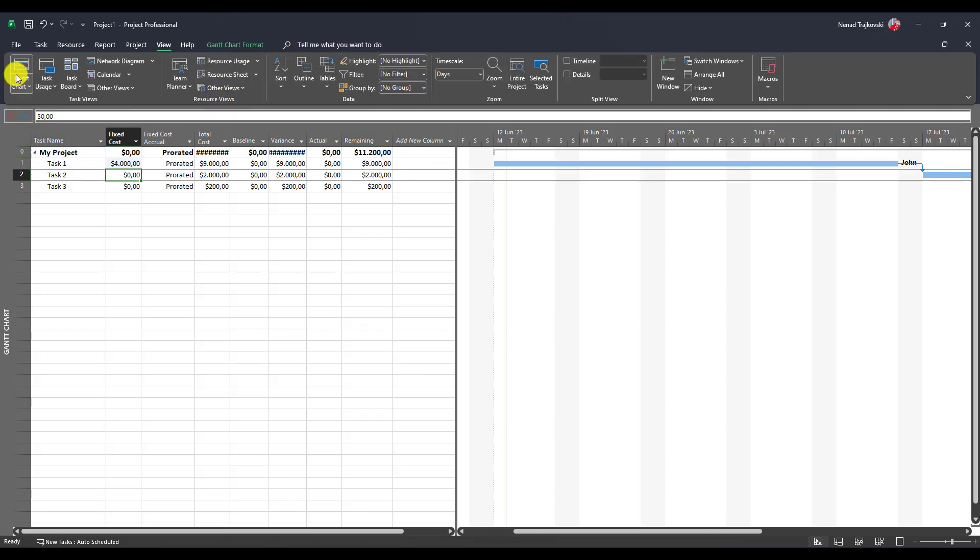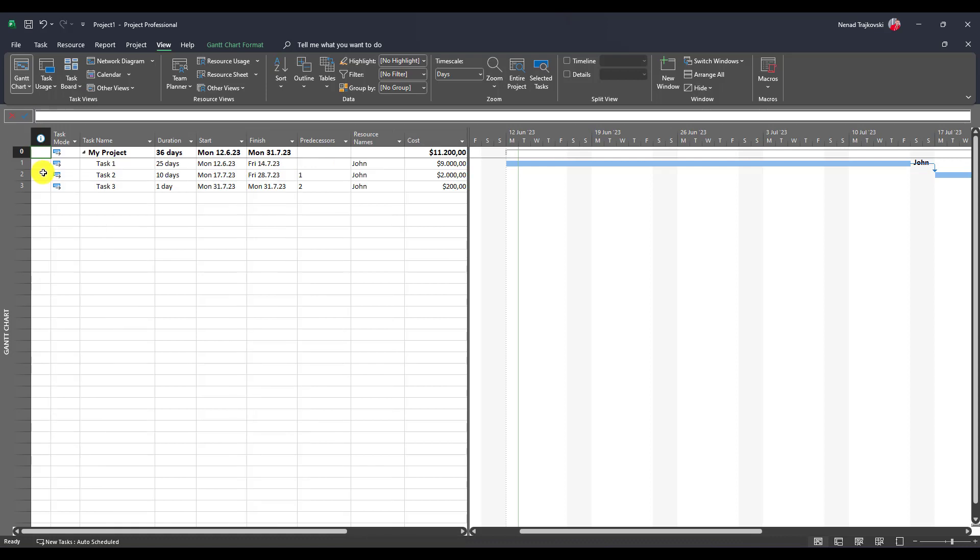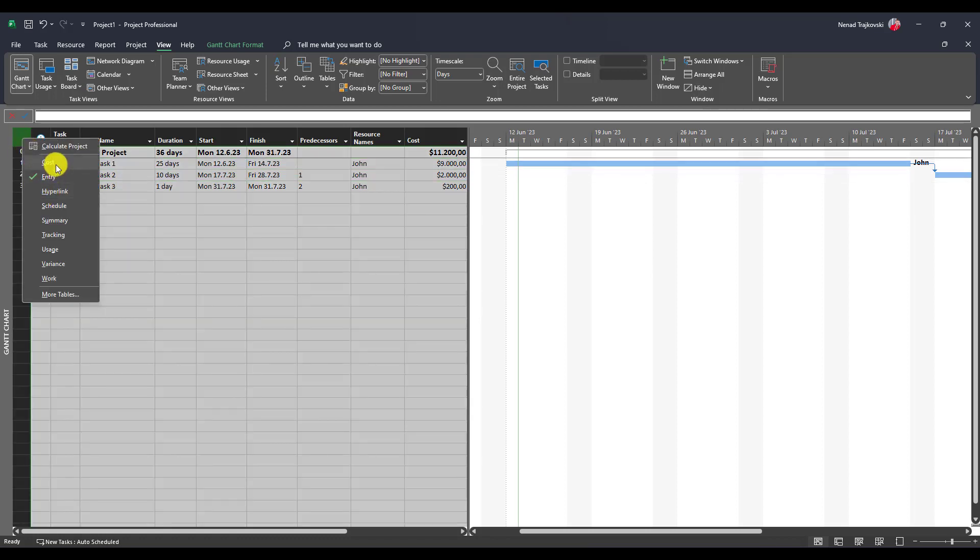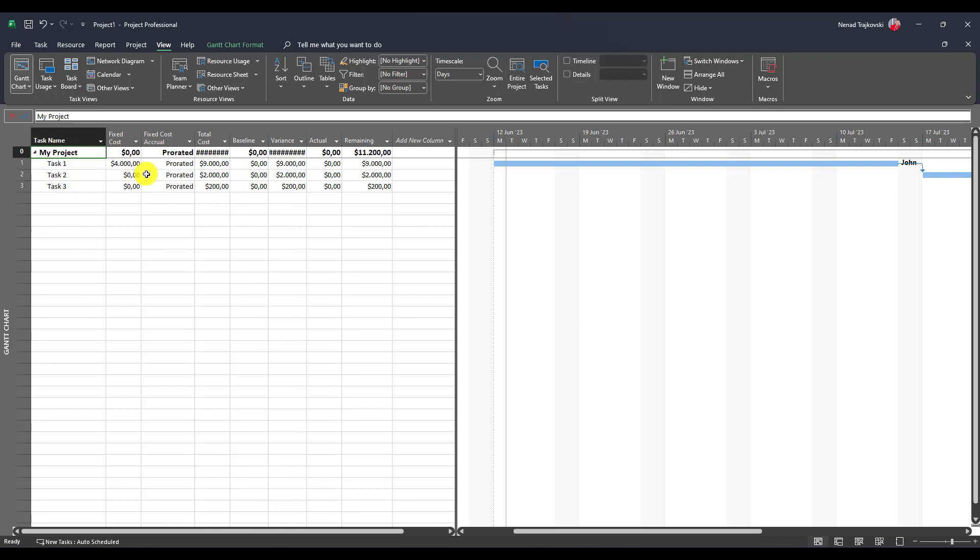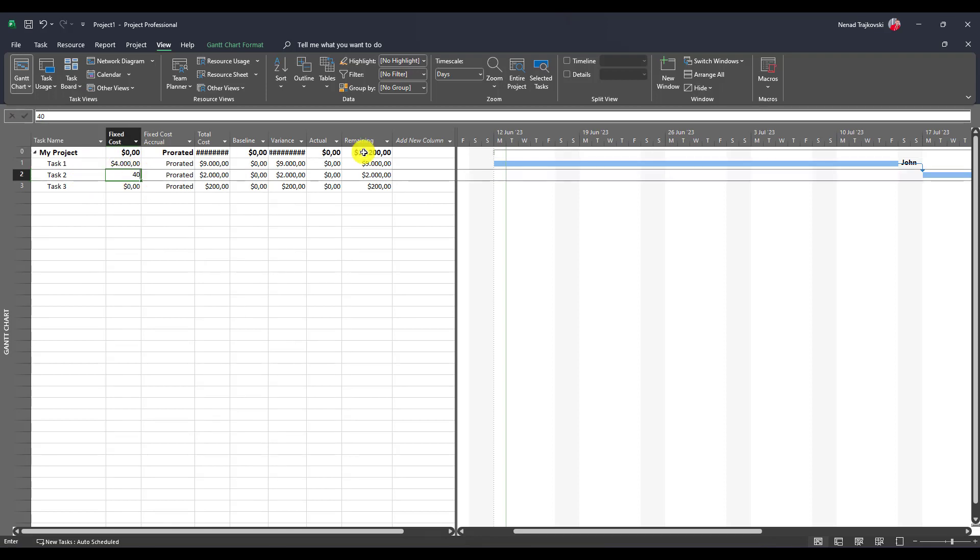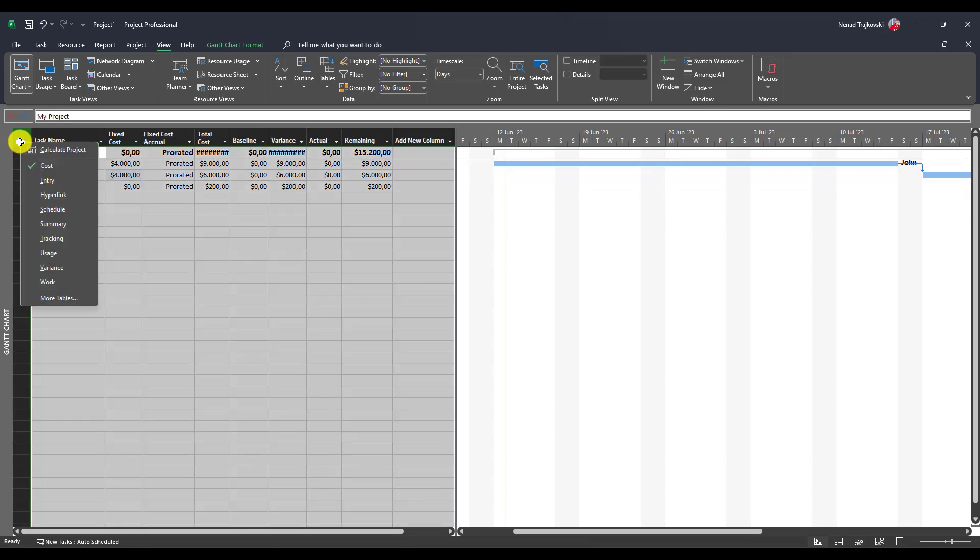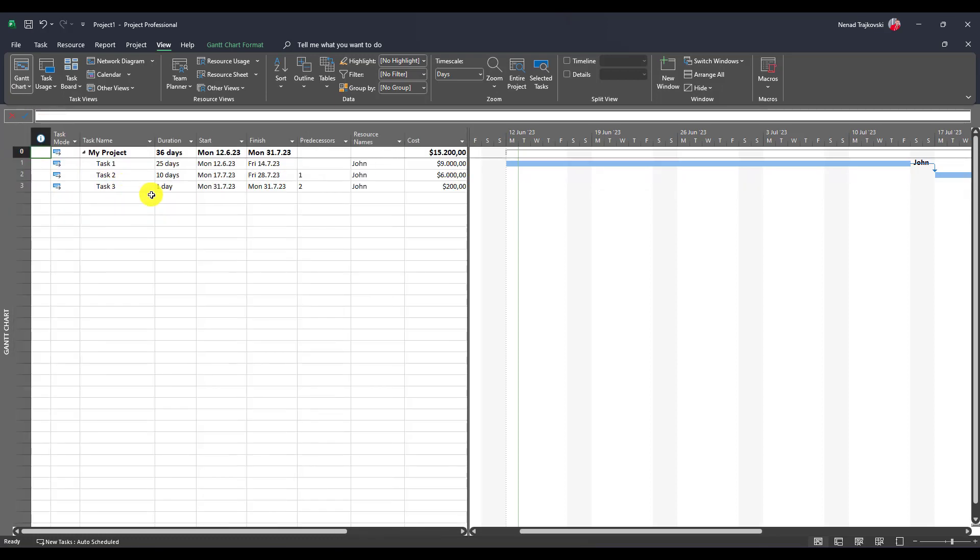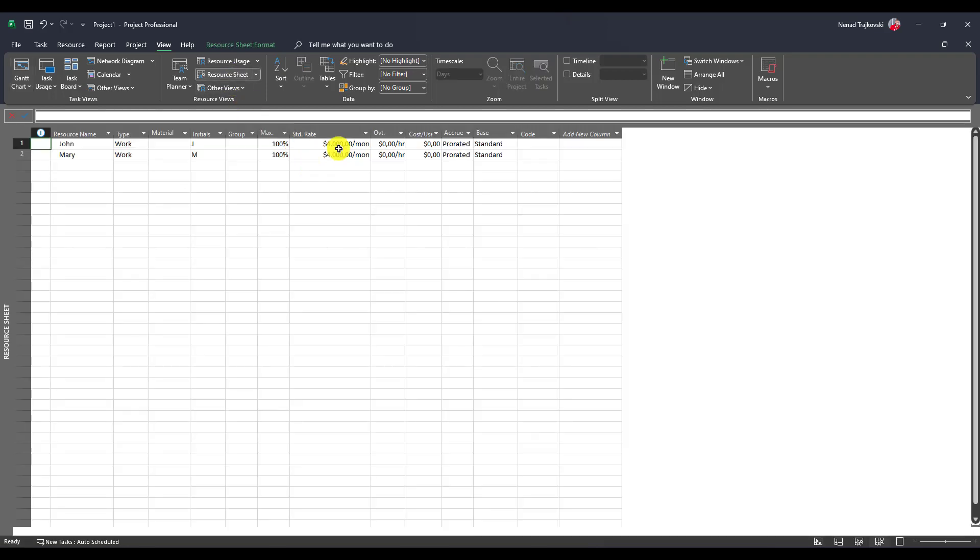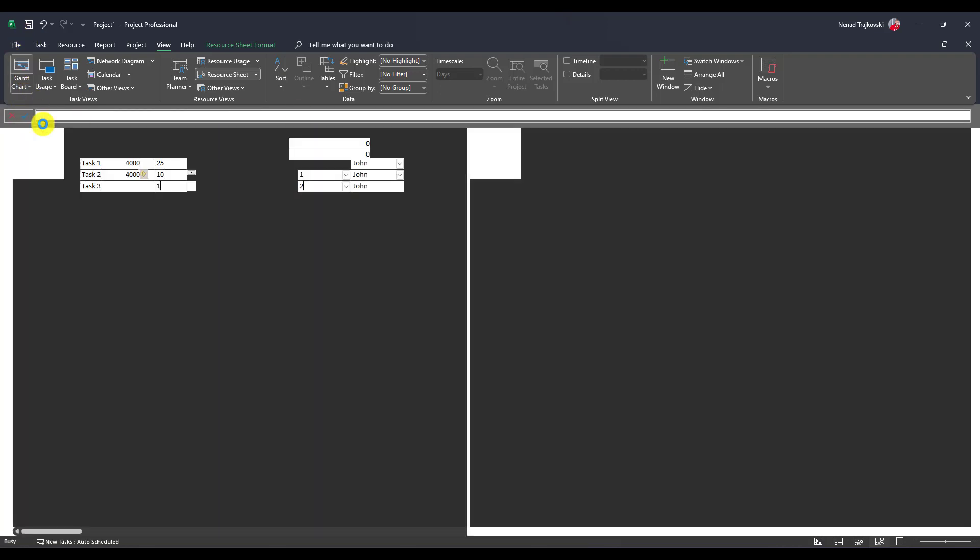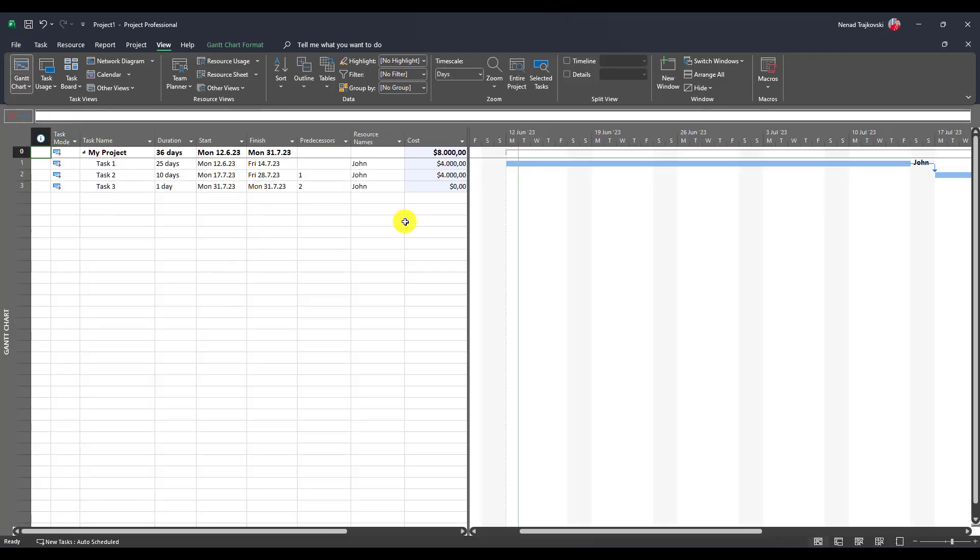Now, let's go back to entry table. And this task goes from July only, on July. Let me put here $4,000 as well. So, and let's go to task three, and let's see. Task three is only in July, but I already put July here, and I have here $4,000 as well. But for this purpose, I should put that standard rate is zero, and I will get here in Gantt chart what I wanted.